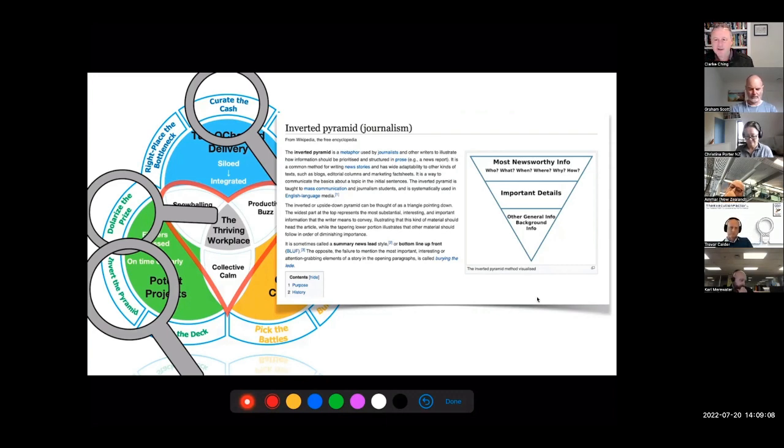Sorry, dollarization, I never explained it. Dollarization is to look at what you're doing, look at the outcomes that you're trying to achieve, and then put dollar signs next to them. So it might be, for instance, I'm going to produce this new product. Actually, I remember when I first did this, it was before Agile, actually. I remember I was just coming into it, and I remember this project I was working on. It was actually the basis of this.